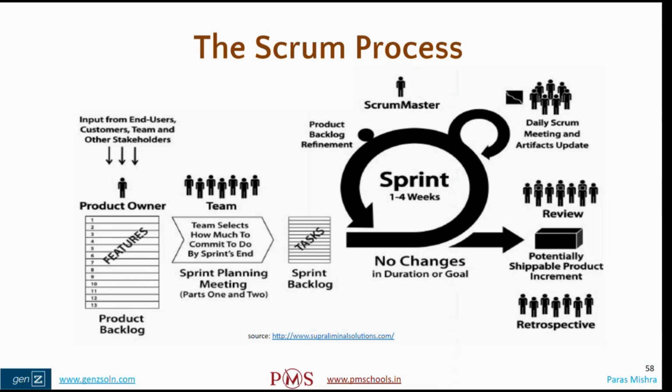That is the reality of the scenario. But this should not be allowed. Ideally, your sprint planning should be so strong that you need not add or drop any of the scope within the sprint because you only have 2 weeks, frankly speaking. If on the fourth day of a sprint, you figure out, okay, I cannot do this, it's better to drop because you may not have time to add anything. So there's no point changing it.